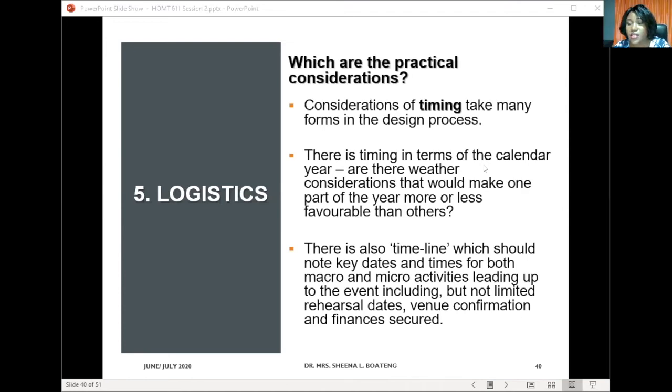Okay, so finances came here as a result of the timeline within which you obtain the finances. Oh, okay. You see, when someone promises to sponsor an event, I don't know, but I think you've organized an event before. It takes a long time to get them to part with the money. Sure. Okay, so we are looking at that. Exactly. So you have to plan such that the timing is enough for you to get the check in good time to pay all the vendors before the event. Okay. It's understood. All right. Thank you. Thank you, Mercedes.